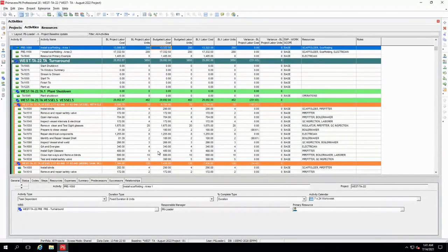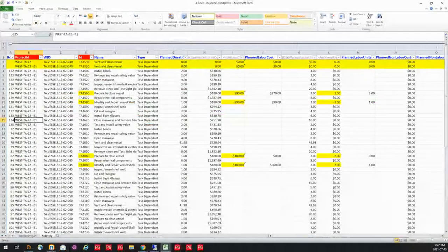I took this a little bit too soon, and now I have some additional information that I actually added into this. So the way I can do that is I can extract out baseline information from P6 or with P6 Loader without detaching it. And also I can change it without using the functionality that's delivered with P6, because I personally find that a little bit flaky and I don't quite trust it. I trust this because I can make it as accurate as possible.